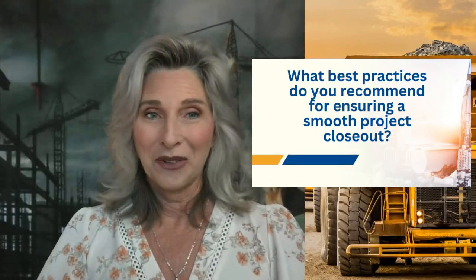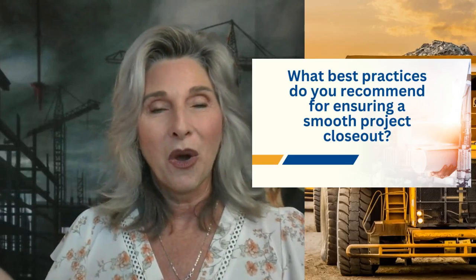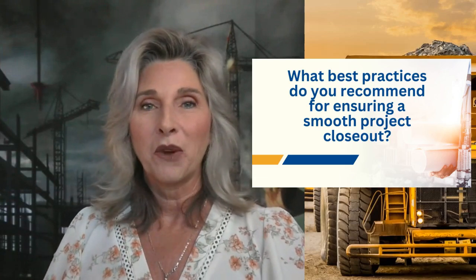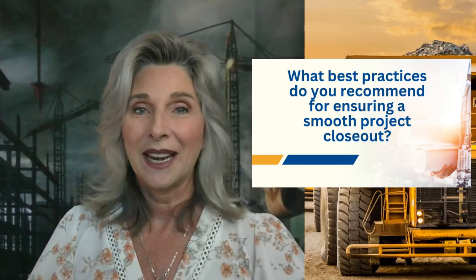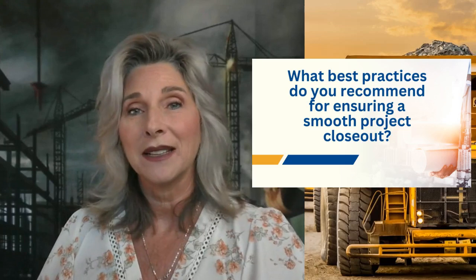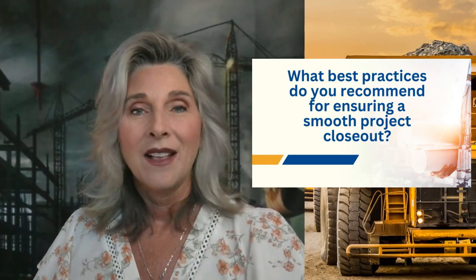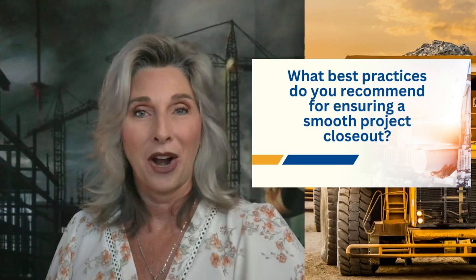So first and foremost, I always preach that we start the project with the end in mind. So always knowing and understanding what that end deliverable is going to need while we're managing throughout the project. This way, when we are putting submittals together and we're collecting, reviewing, and approving those submittals at the very beginning of the project, we can start to see and recognize what types of things might be required in an owner's and maintenance manual at the end of the project. So when we are able to start collecting that information throughout the project, instead of waiting until the very end, then we can get all of that information much easier than after the subcontractor leaves the project.